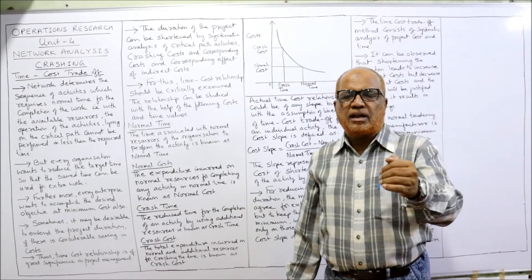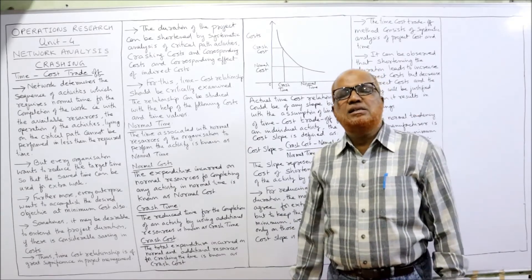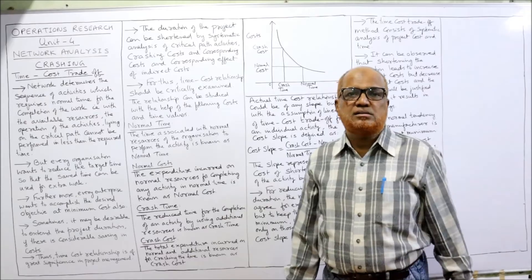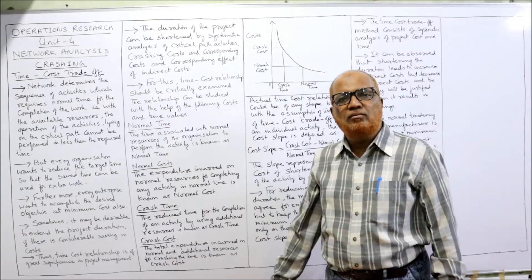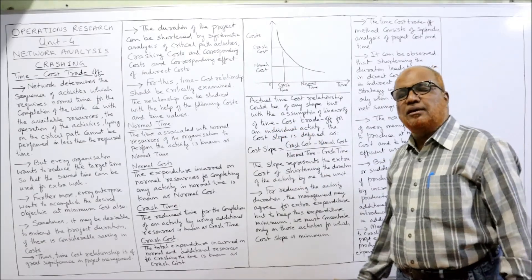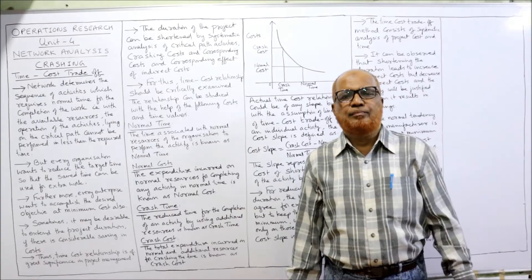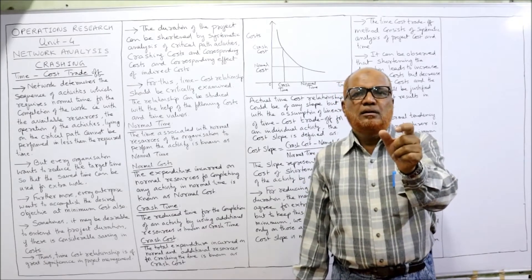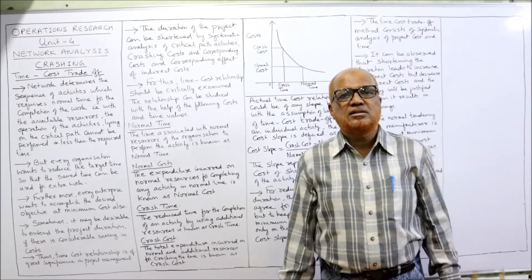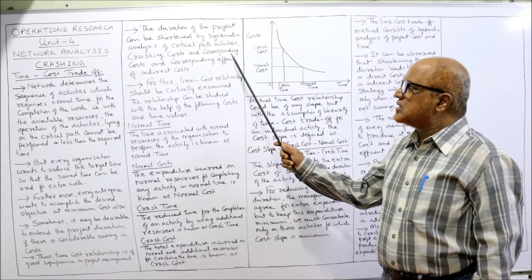If the project manager wants to reduce time, he has to employ additional resources, which will increase cost. So there is an inverse relationship between time and cost: if we reduce time, cost increases; if time is increased, cost reduces. The duration of the project can be shortened by systematic analysis of critical path activities. The critical path is the longest path from the first event to the last event, where EST and LFT values are equal. There should be no delay in critical activities, as any delay will extend the total project duration.